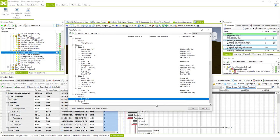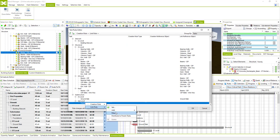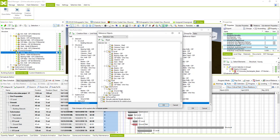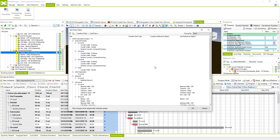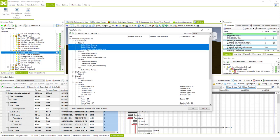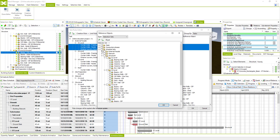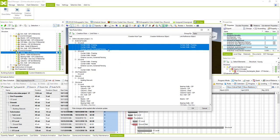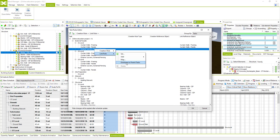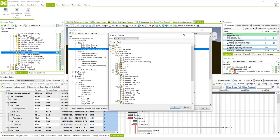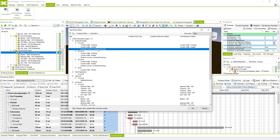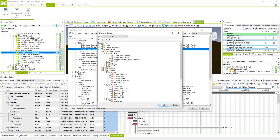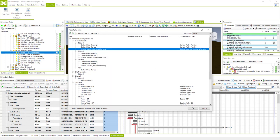I'll repeat the mapping for level two. For beams we don't have the selection sets so I'll ignore that currently. Going to the third level, I'll select all selection sets, hit OK. We can do this for all tasks — for the roofs, hit OK. For the ground slab, map or use linking because it's just one selection set. The same goes for foundations — it's just one task so we use map again, choose foundations, hit OK. We can do this for part of the external facade elements. The process is clear — it's really helpful to match by name.